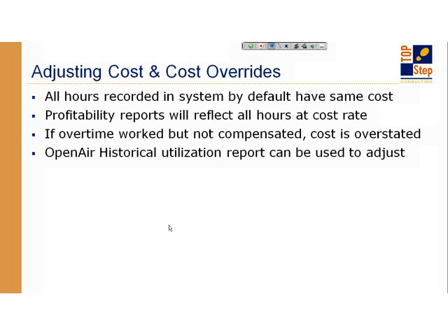The other view is those 50 hours should not be the same value hour for hour. They should be adjusted to the fact that they're only worth 40 hours worth of work. So you basically reduce the cost by, what, is it like 10% or something like that? You reduce the cost per hour so that the 50 hours that a person worked this week is still the same cost as a 40-hour work week. That does make the profitability more accurate on the project, of course, because what that means is you're only accounting for the salary the person is earning, not every hour that they work.